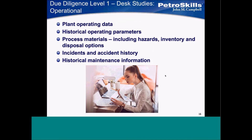So, due diligence — operational. In your office, what you want to do is get access to the plant operating data, historical operating parameters, all the process materials utilized out there, incident and accident history, and historical maintenance. Historical operating parameters: if you compare them with plant operating data and see a particular heat exchanger has a high pressure drop across it, that probably tells you something. Or if there have been substantial temperature excursions, that also tells you something.